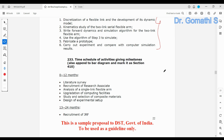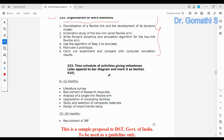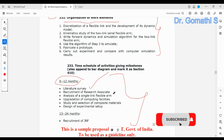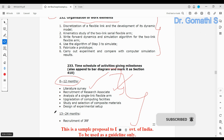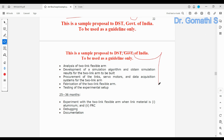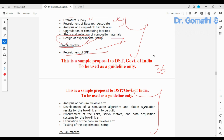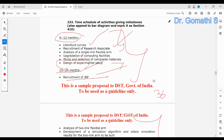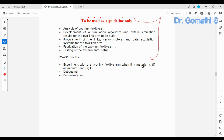For the time schedule, make sure the time you mention here matches what you stated in the earlier pages. For example, if the project is 36 months, explain what you will do in the first 12 months, months 13 to 24, and so on. In some proposals they give it month by month, but every six months or every year is also fine.